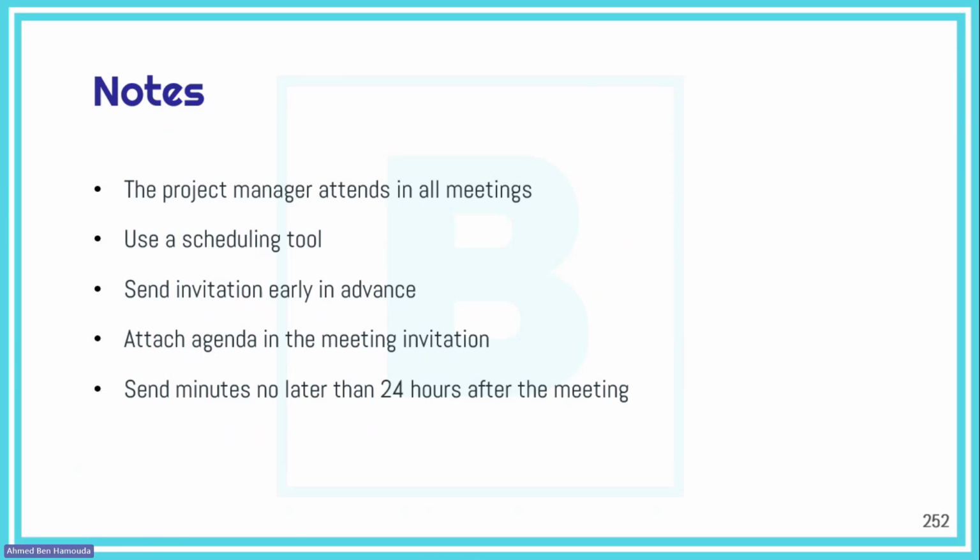Make sure, usually 48 hours or 24 hours before the start of any meeting, that you call the most important stakeholders and confirm that they will attend. It might be exhausting sometimes, chasing all those people around, but you will have to do it for your project's success. Remember, you're a project manager, you're responsible for your project's success, so sometimes you will have to do it.